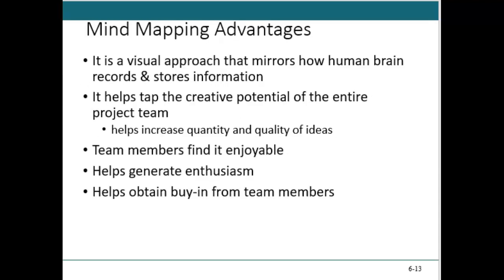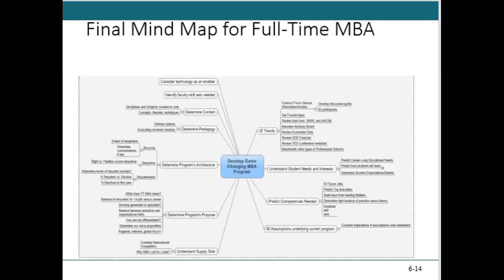One of the ways we do a whole-brain approach is through mind mapping. When I was in the Air Force, I had a project and I had no idea where to begin — it was massive. It was a whole new inspection system for the entire command. So I just put the problem right on the center of the wall. Over days, I began to talk to people and learn: I've got to talk to headquarters here, a separate line to the headquarters at the Pentagon, a separate line to the various wings or bases — Air Force bases — that will be affected. From there, I developed something that looked very much like a mind map. I didn't know it at the time, but that's what I was building. You can see in the mind map: the key problem stated in the middle, and the places that are affected. Once you identify the places affected, you work out what under them needs attention, and from there I was able to create an execution checklist. Mind mapping — very useful. It was an accident; I stumbled upon it.